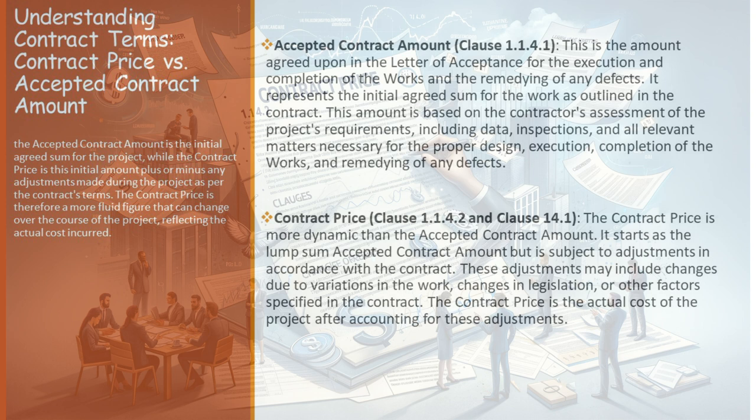This clause ensures that the contractor is not unfairly penalized or benefited by changes in law that occur after the contract has been signed. Another important aspect to consider is the role of the engineer in these adjustments, as outlined in Clause 3.5. The engineer acts as a mediator and a fair judge in cases where there's a need for determination. They consult with each party in an attempt to reach an agreement. If an agreement is not possible, the engineer makes a fair determination in accordance with the contract, taking into account all relevant circumstances.